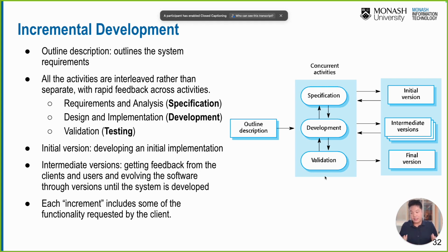If I were you, I would just say, hi customer, as we have written in the contract, we have only a 1-year period to develop the piece of software. I'm afraid we may not be able to deliver these kinds of features within the timeline constraint. What about we try to prioritize what are the must-have features, what are the should-have features, or some features that we don't really need at all. That's why we need to prioritize what is needed and what is not needed. We'll talk about task prioritization in the next few weeks as well.